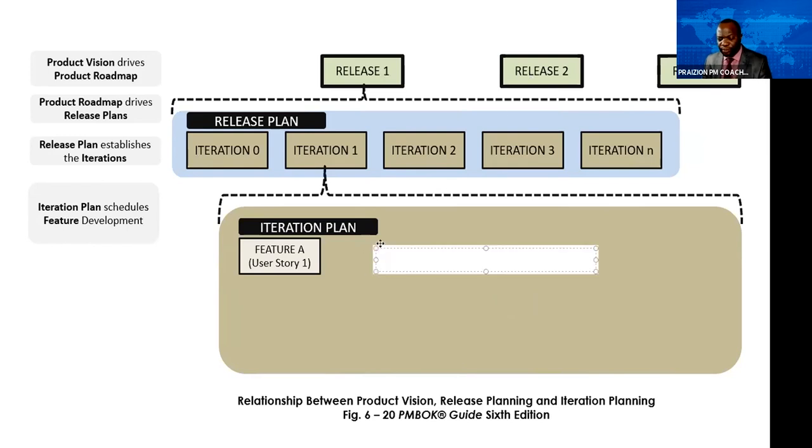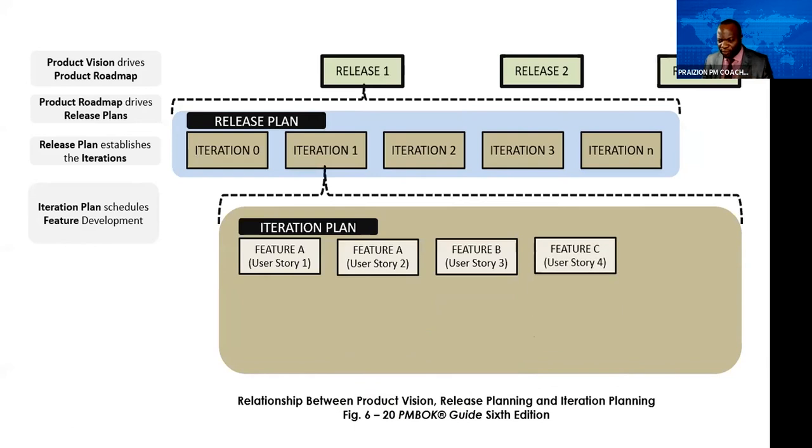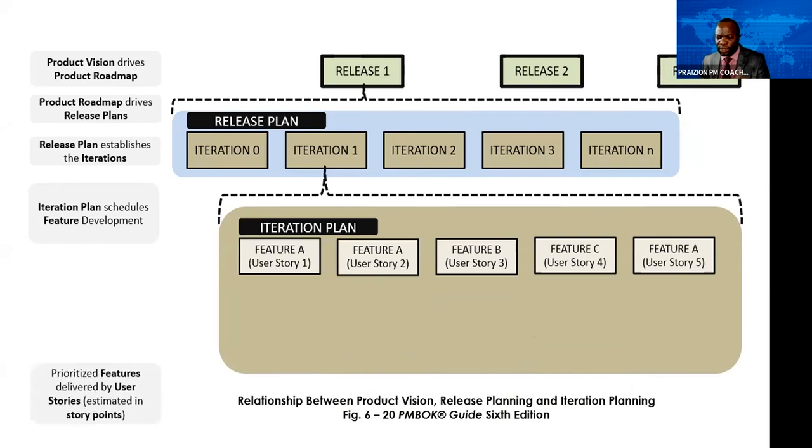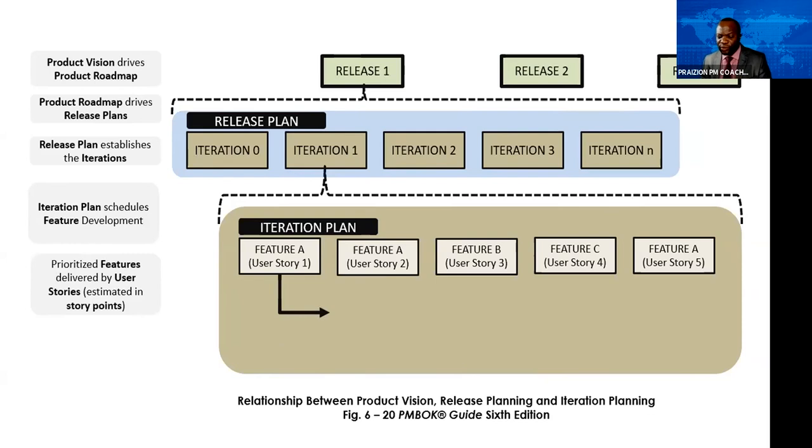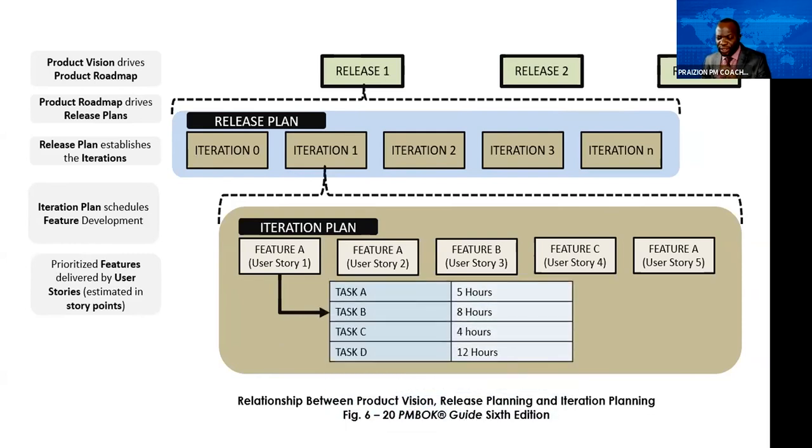Okay. So your sprint backlog is going to have all of the user stories that you are working on under each iteration. So your iterations are going to have all of these features, you know, the user stories. And then for each user story, you've got to plan the tasks. You know, you've got to plan out, okay, in order to get this user story, we're going to code this, code that, code the other. So you begin to prioritize your features, and then you begin to go into the details of how long each one would take. Or you could use story points to say, okay, that is 50 points, that is 20 points. And the whole talk about story points is a little bit outside of this, but I would say if you have not read the Agile Practice Guide, you should. And if you do not have an overall idea of Agile or Scrum, you should.